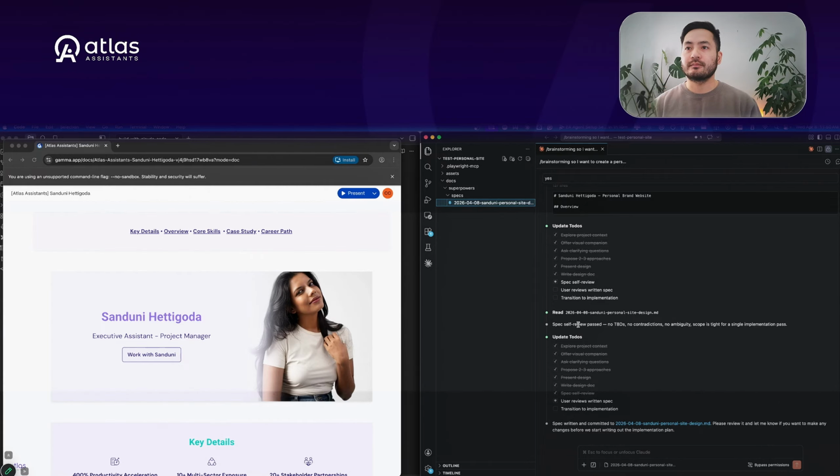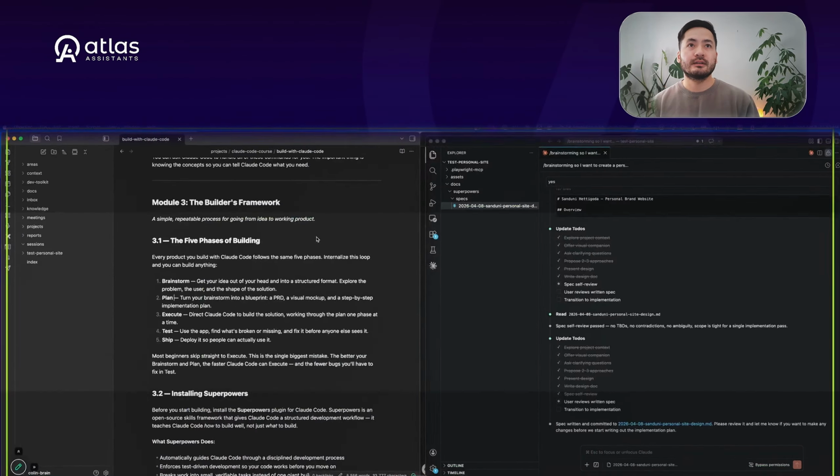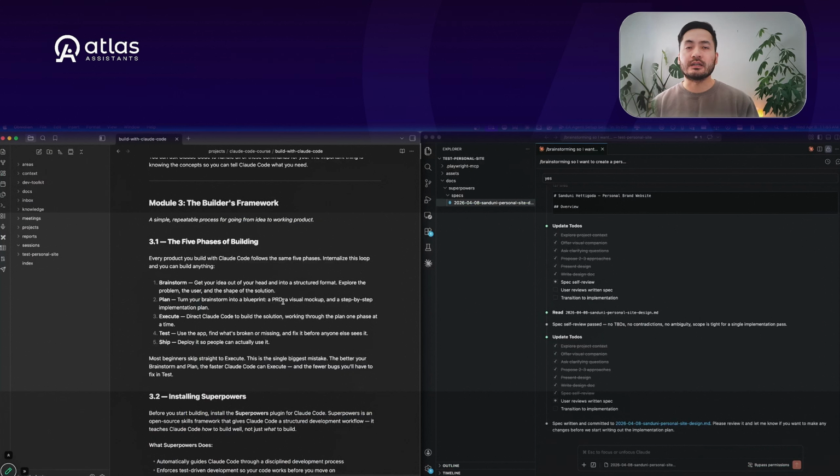You can review it, see if it makes sense. If it's all good, then the next step is you want to take your PRD. In some cases, you may want a visual mock-up of it, right? This is if you're building an app. What I recommend is don't jump straight into executing and building the app right away. You want just a simple visual mock-up of it, right? So an interactive mock-up, so you can actually play around with it. It'll have mock data, and that's totally fine because you want to validate and make sure that it is aligned with what you want to be building first.